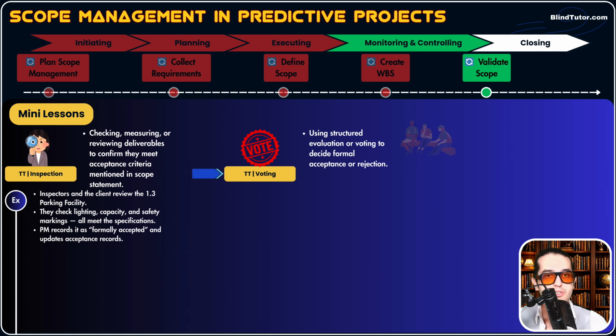In these situations, you need to use the tool called voting. Okay, you go and check the scope management plan, the section on how to validate the scope. In that section, it may say, for example, when these conflicting ideas and opinions about verified deliverables happen, use, let's say, majority decision-making analysis. By majority, I mean 50% or more of stakeholders need to consider one deliverable as accepted.